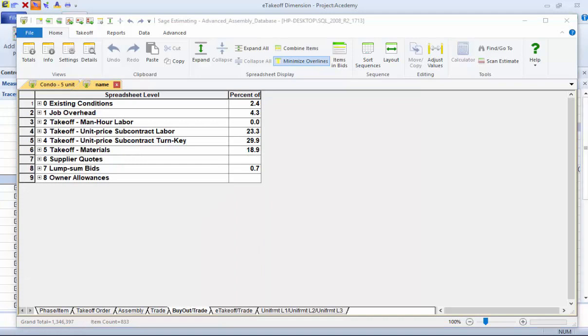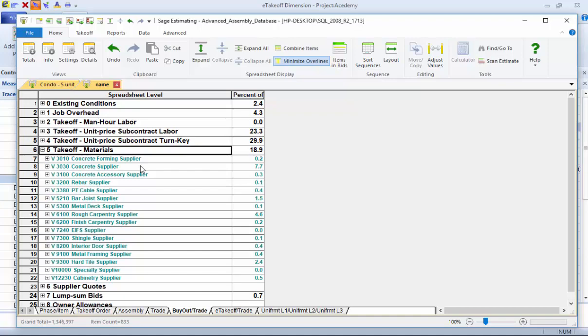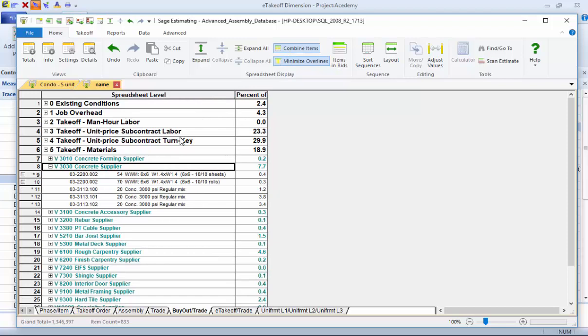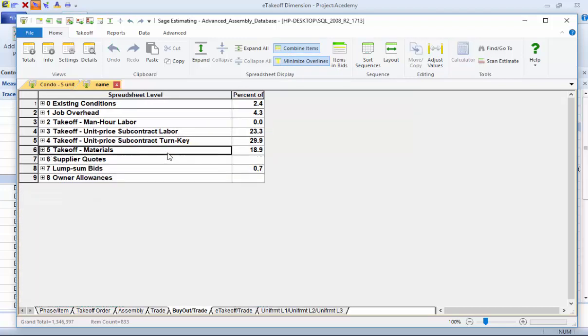But my favorite layout is buyout. To me, it offers the most bang for the buck. It's easy to review, becomes part of the actual buyout process, and it's an easy way to see how much of the estimate was estimated. In this case, over 90% was estimated, and only 4% came from bids. Ideally, it would be the other way around. This layout is helpful to prepare RFPs, compare trade bids against the estimate, write trade contracts, and write purchase orders.